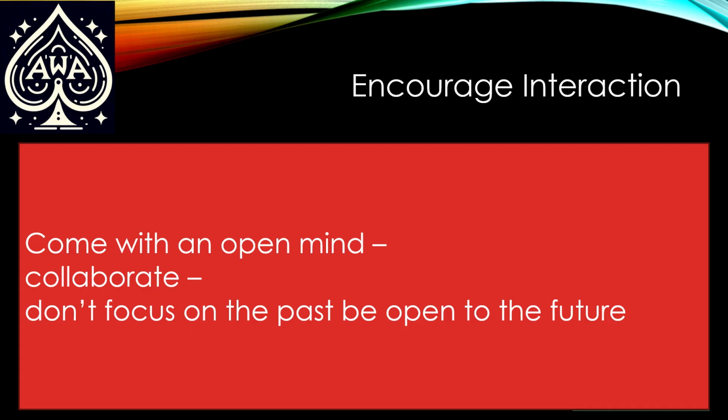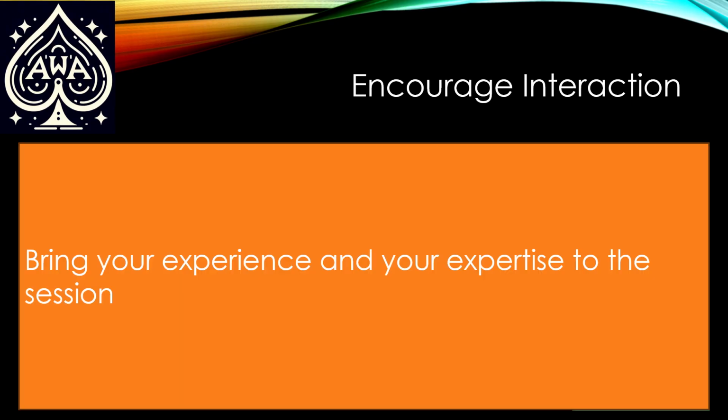That gets to Lee's slide from a few minutes ago about how you prepare. Make sure the script shows it. I would really encourage you, Mr. Consultant or Mrs. Consultant, have a mini session before. Meet with the customer ahead of time to understand, hey, if I show this in a room full of people, is this going to meet the requirement? And really have open and honest feedback as you go through those sessions.